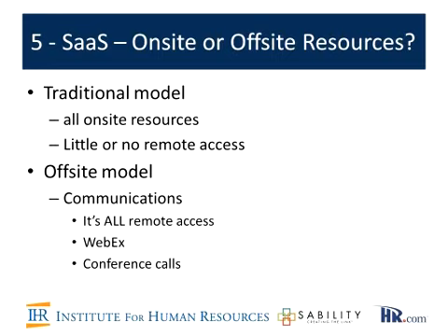In reality, we find in the SaaS world that people are often waiting on different things. So there's configuration to be done, and then there are several questions that the consultants will ask of the vendor, and then it takes time to get those answers back. You really don't want someone sitting on site, wasting your money, waiting for the next thing to come in, working on other things. It's just not practical during all phases of the project.